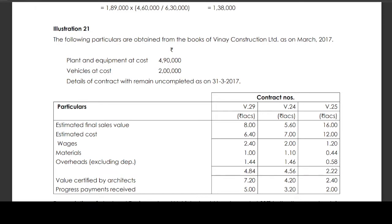For contract V29: Estimated final sales value is Rs 8,00,000. Estimated cost is Rs 6,40,000 — comprising wages Rs 2,40,000, materials Rs 1,00,000, overheads excluding depreciation Rs 1,44,000, totalling Rs 4,84,000. Value certified by the architects is Rs 7,20,000. Progress payments received is Rs 5,00,000 and Rs 3,24,000.